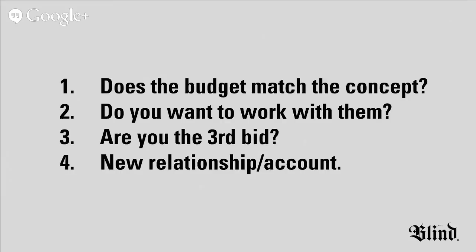How do you know you're underbidding or not? I think first, just to kind of give some context, when you think you're underbidding, it's because you're working on a project for a really long time and maybe you've entered into what industry people call scope creep. And it's gone beyond. Somewhere along the way, it was a slippery slope. You agreed to do a few changes. Two changes turned into 17 changes and now you're feeling like you're upside down on this job.